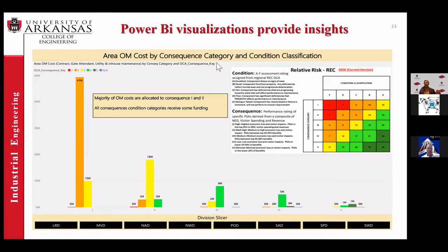Another example of the dashboard looks at risk with some of the information. Our big surprise from this is that none of the red had funding, right? So you don't see any funding down here that's red. That means that there are no high risk, high reward projects being funded.